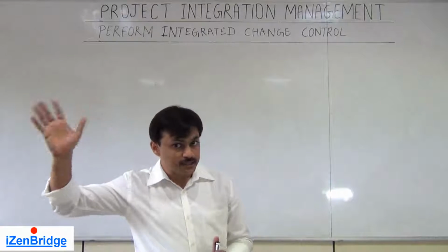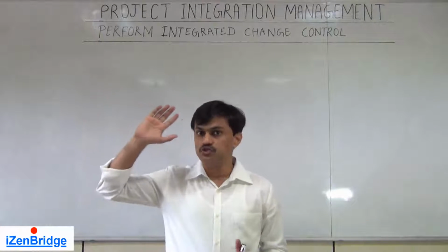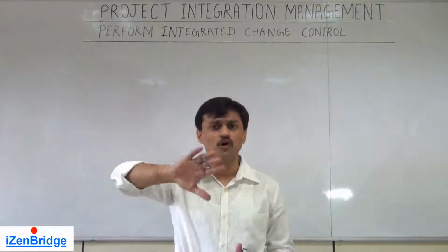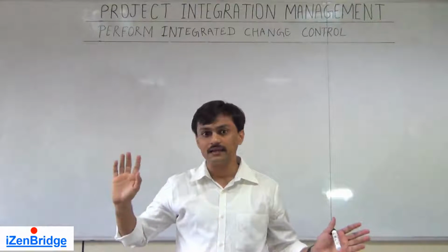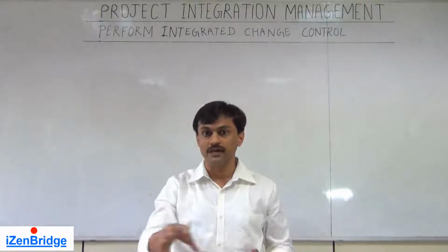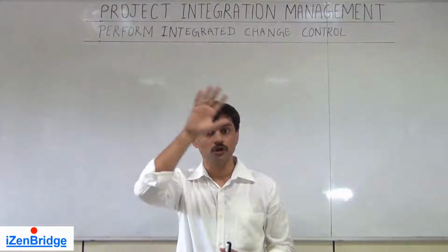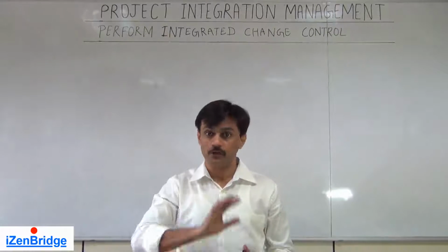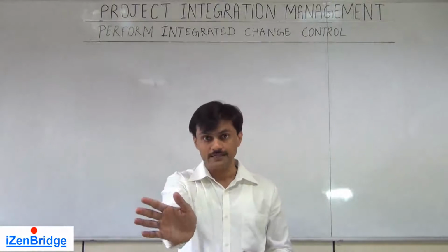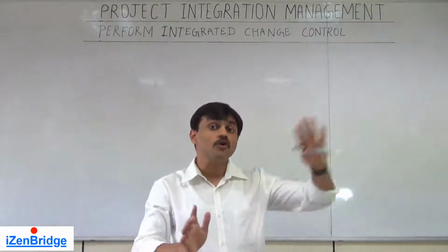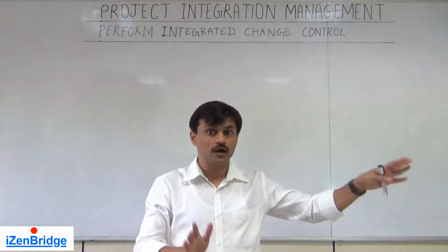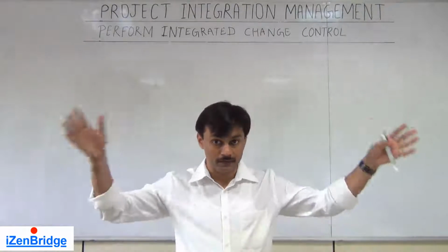If you want to delay some activity by 10 days for whatever reason, you cannot take the decision by looking at your project schedule only. The project integration has to be taken into account, because that delay of 10 days might delay some procurement related milestone which you have planned in a big project.